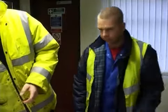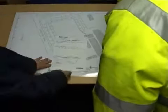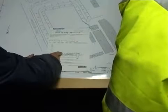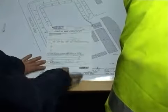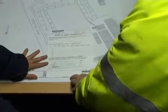Okay then, Dean. Another good job. Well done. Is there anything that I need to sign for now? Yeah, just need to sign the proof of hire sheet now. Which is basically Friday. Yeah. What time I arrived on site this morning. Okay. Meal break. What time we leave site. Okay. And then arrive back at the depot. Then all you have to do is sign, because I'm actually signing for the hours that you've actually worked.